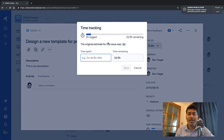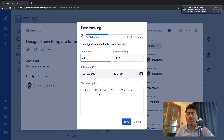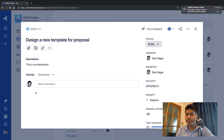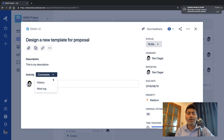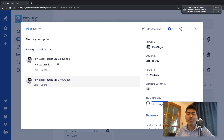You can add a comment like 'I worked on this', then save it. You can then add one more log entry — say seven hours for today — and as you log your work you can see the progress bar updating at the top, which is very useful. If you want to see all work log entries, select the work log option and it will show all logs for that issue.